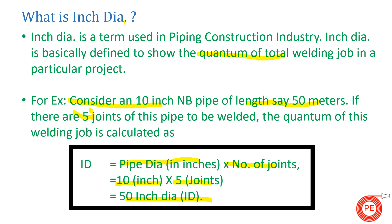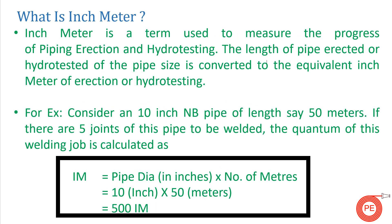Suppose you are working in a construction project and at the end of the day your boss asks how much work you have done in terms of welding. You will answer that you have done 50 inch dia of work. On this basis we calculate planned work, total work, how much work is left, and how much has been done.